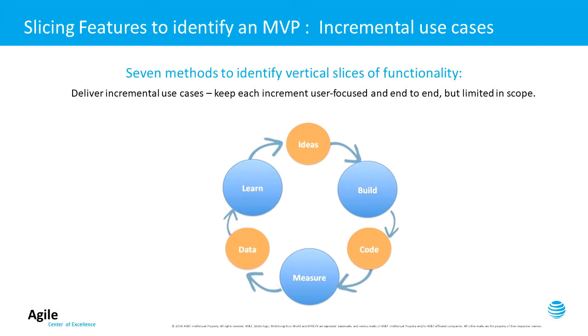You could separate out different user groups or channels or regions or formats individually before adding and supporting others. For instance, consider launching the features just for a limited user group, or maybe just for wireless consumers, or in a single geography in one language, or on mobile only. The solution may logically be the same in all cases, but the delivery of the feature on each channel could be rolled out as a different feature within the whole initiative.